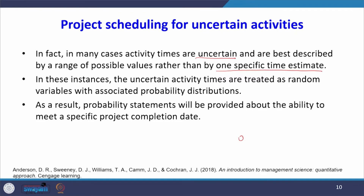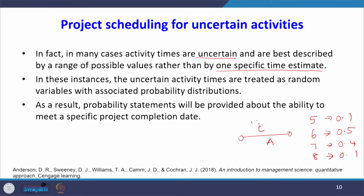For example, the activity completion time may follow any distribution. The probability of completing in 5 days may be 0.1, completing in 6 days 0.5, 7 days 0.4, and 8 days 0.1. This time estimate t is following an empirical distribution — it can follow normal distribution, uniform distribution, or beta distribution. In this class, we assume the activity completion time follows beta distribution.